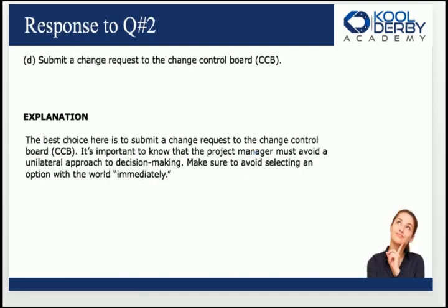So let's look at the solution here. D, Delta, the best answer: submit a change request to the change control board. This is through the process called perform integrated change control. And notice that you've gone through the process. The explanation is the best choice here is to submit a change request to the change control board, the CCB.